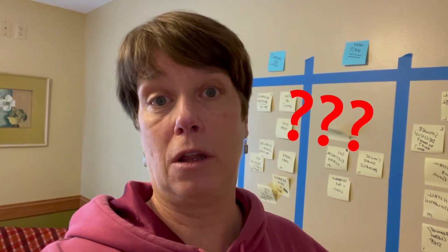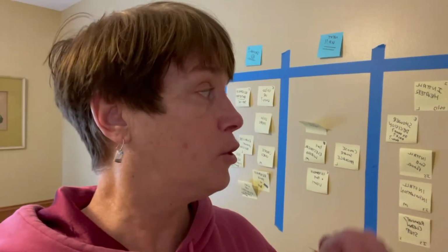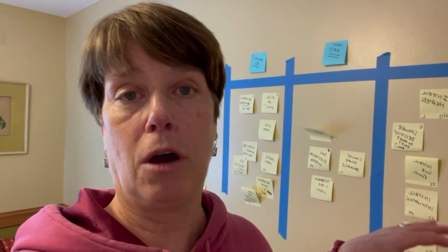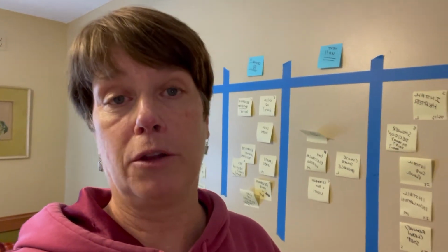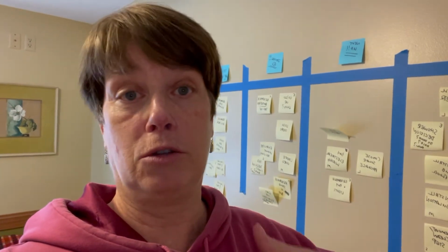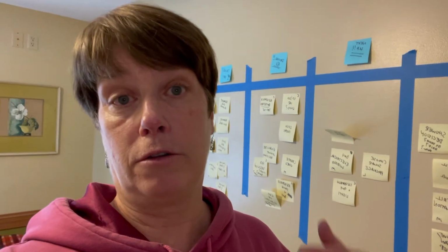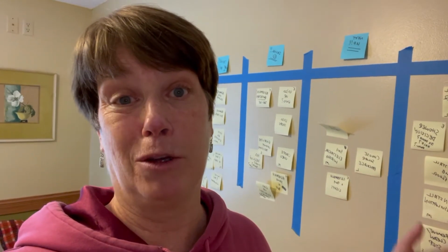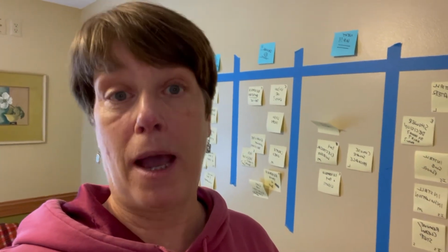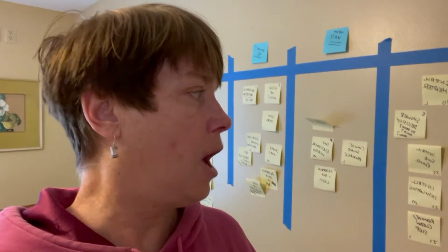A lot of the work I don't even know how to do. So if I'm not sure how to do something, I'll go ahead and put a research item up here. In the Agile world, we call those enablers, because they enable you. You do some research, you learn a little bit, and then it enables you to do the next step. A lot of the other activities up here that might be enablers are something like where I have to buy a product. So I got to buy it before I can install it. So there's a lot of activity here.